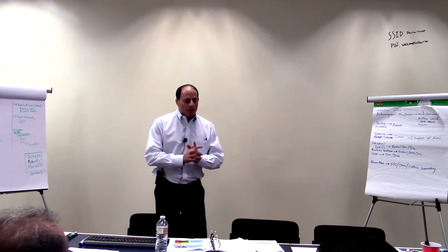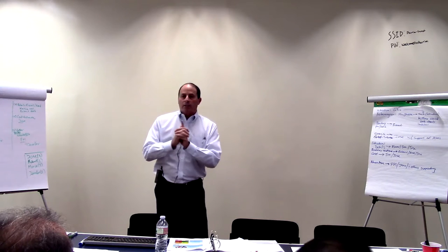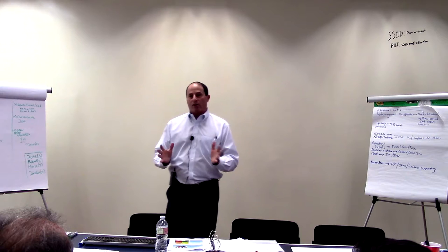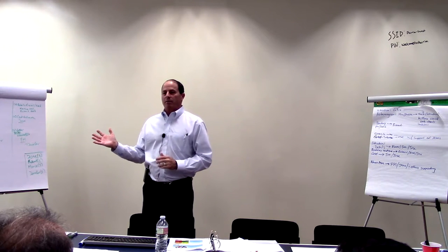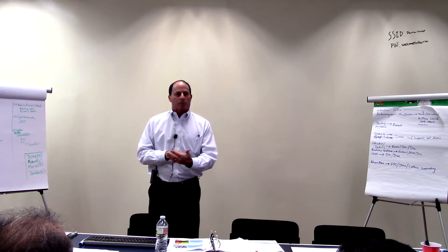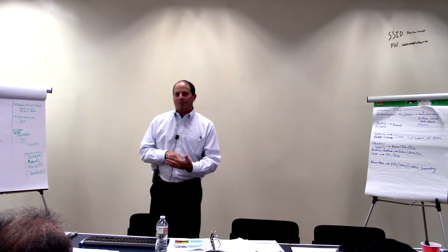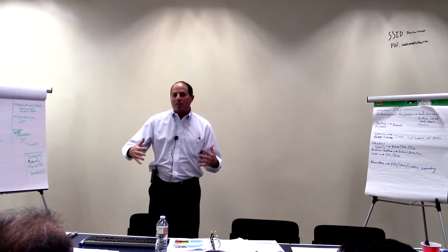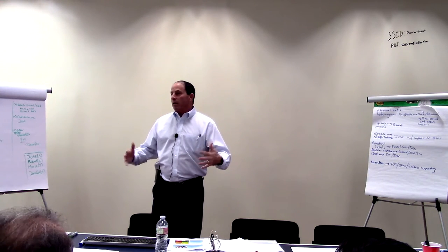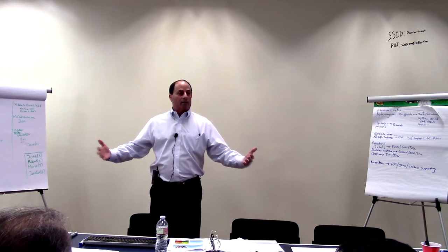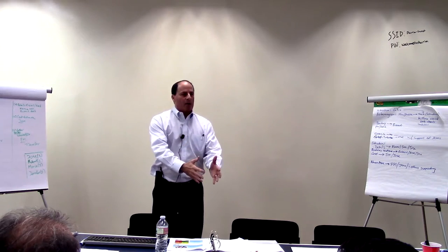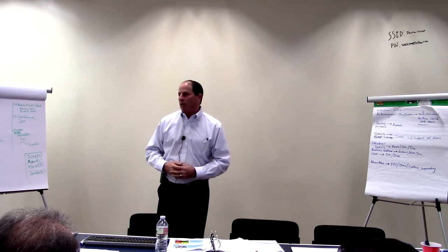The one thing I would say, though I maybe didn't give you enough, is don't default to a sub. My thought process would have been, I probably need to go to one of the other PMs and see if I can borrow his structural, because we want to keep it in the family. Only when we don't have that resource available would we say we've got to go outside. That's really the only thing. But the idea that you didn't have that capability there was the key point, and you all grasped that.